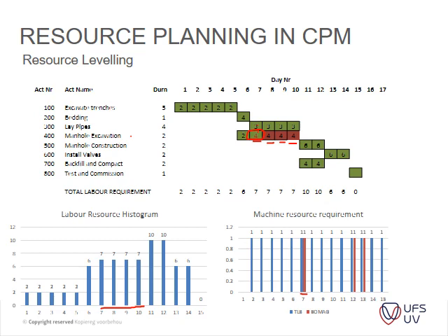We added the 4 laborers, but it didn't have an effect on our completion date because everything was still done on the same day. So this was a nice example of how it can be mitigated without using too much labor or adding another day to it. That's more or less what resource leveling is.